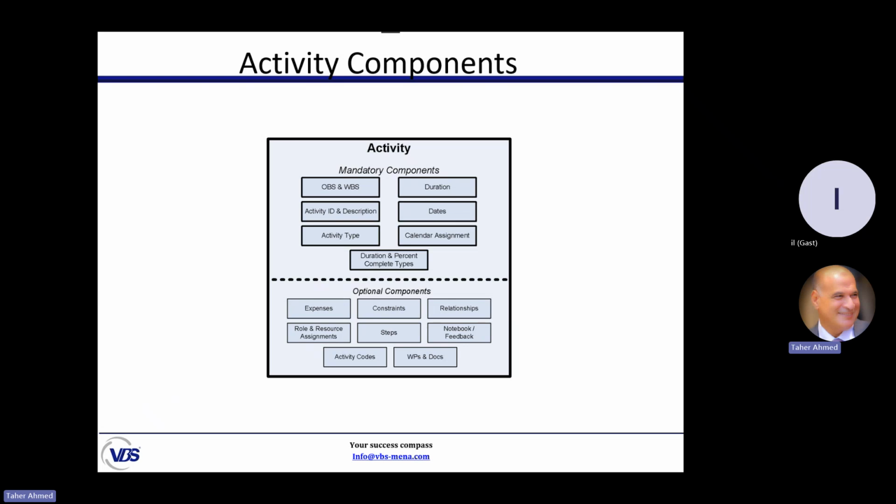You're like, I'm the civil engineer, so I know the technical side. Give me this package and I will define the activities which must be done to complete this package. As an example, I have to excavate, then pour plain concrete, reinforcing concrete, insulation, backfill, then slab on grade. There are many activities that must be done to complete the deliverable. Who knows these activities? The one who is responsible for each package. So in real life, we take each package and move it to the responsible manager.